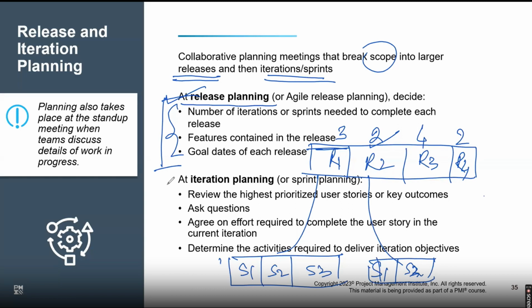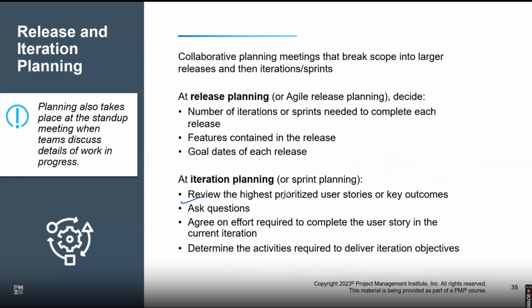And then you know the sprint planning also. By default, the sprint one, because we've done. So the product owner will be prioritizing the user stories. You will be asking questions about the user stories, which is where the DOD part will come into the picture. The team will pull the effort, depending on how much they believe, in say sprint 1, how much work can be done. So based on the effort understood, they will pull the items into that particular current sprint, and then they will deliver the job in that sprint.